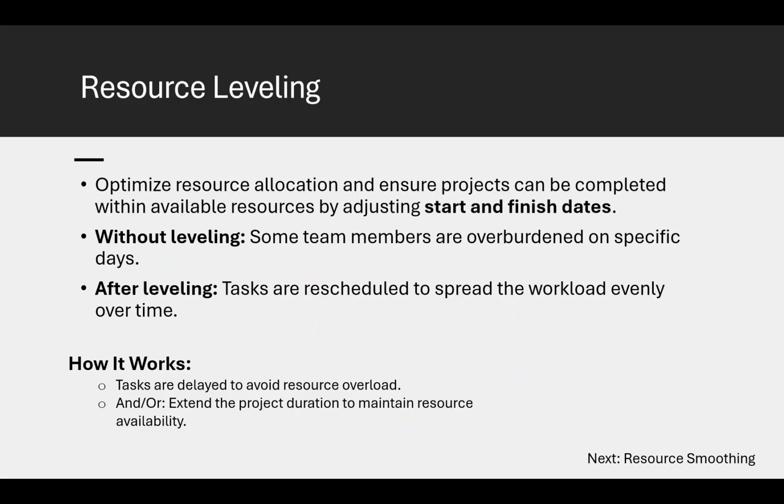We can adjust the start and finish date when we use resource leveling. If that's not available to us, we may not want to use resource leveling. Here's an example. If you don't use leveling, what can happen? Some team members can become overburdened on specific days. Overburden, burn out, turnover, right? But if we use resource leveling, the tasks are rescheduled to spread the workload evenly over the length of the project.